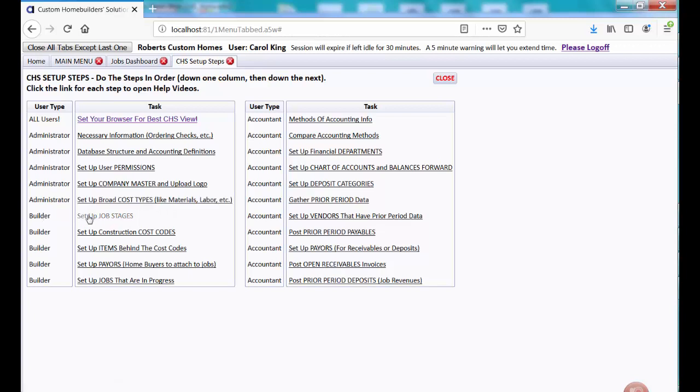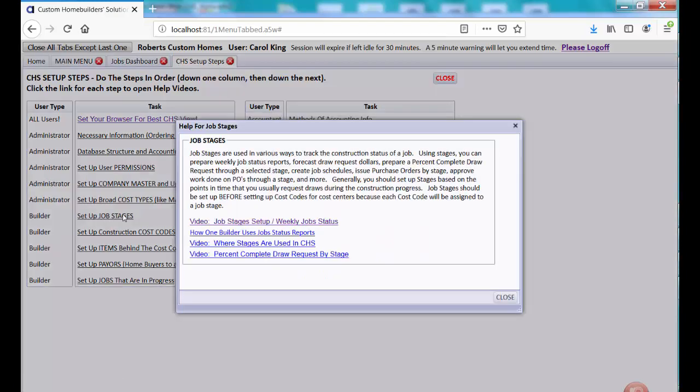In this particular video, we're going to talk about setting up something called job stages, and I'm going to go ahead and click this to see the help stuff about it. These are not about setting up your cost centers like roofing, framing, plumbing. These are broad categories. Job stages sometimes are referred to as phases by some builders. They're used in various ways to track the construction status of a job.